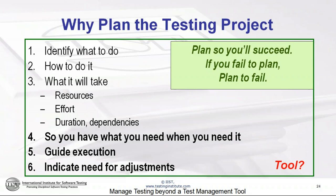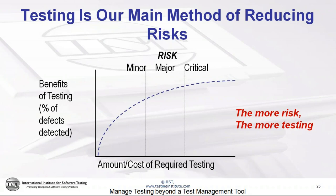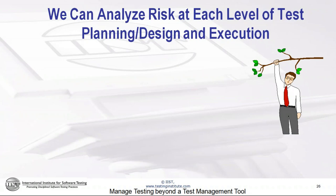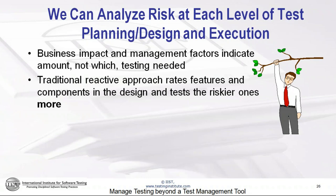Tools don't do planning — tools capture that information and maybe make it a little bit easier to work with, but the tool will not identify what to do or how to do it. With testing, what we're doing is reducing risks. There's a fundamental relationship between risk and testing: the more risk, the more testing we need to do. We can analyze risk at each level of planning, design, and execution — business impact, management risk — but these don't tell us which testing is needed.